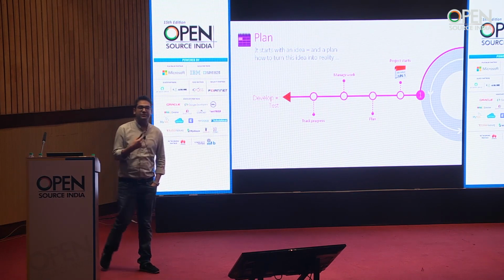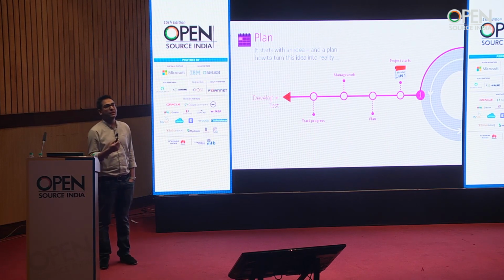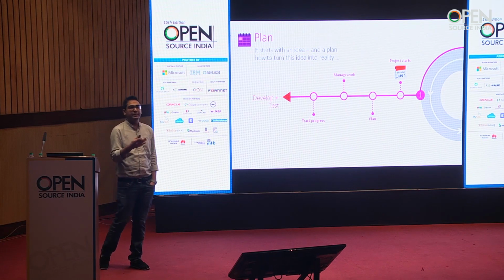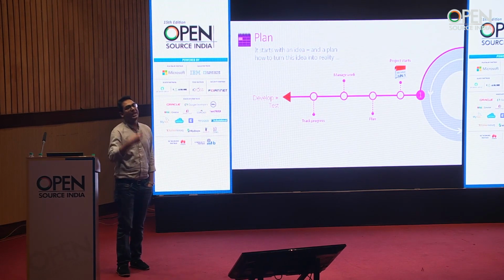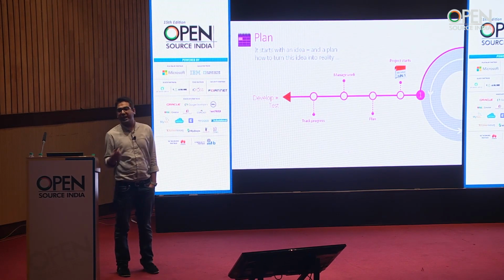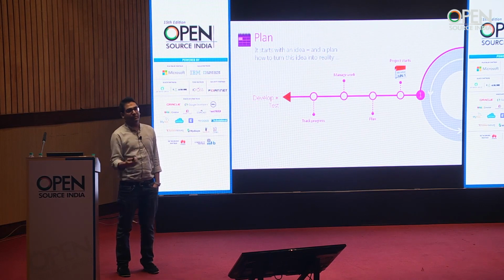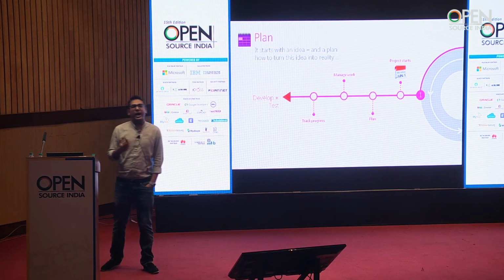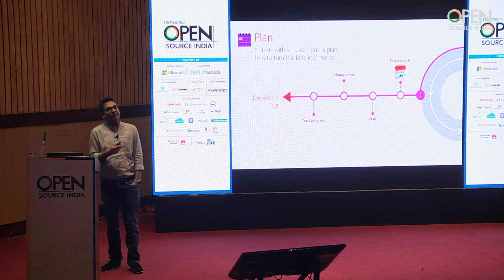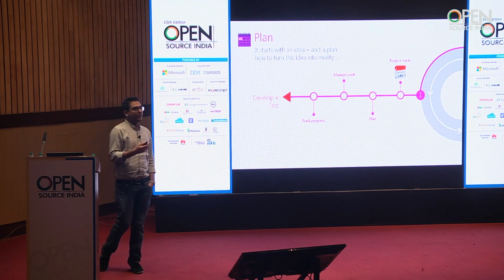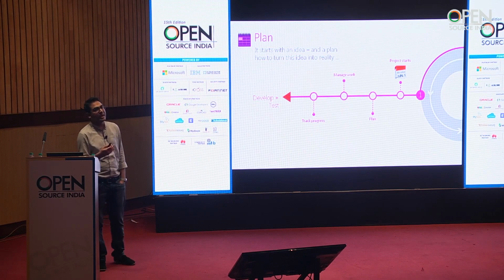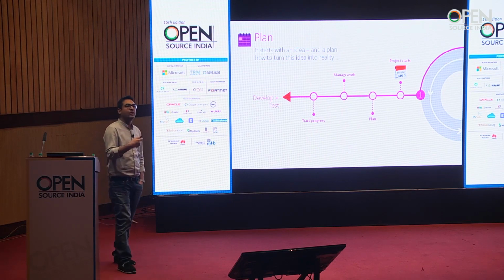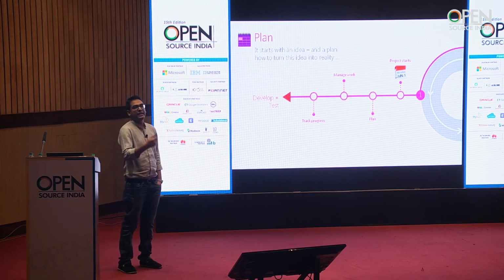Each sprint in our case is of 3 weeks. So we iron out exactly what you would be doing as a development team for the next 3 weeks, and we have a vision as to where we would like to be 3 sprints from now. I, as a product manager, have to always be a couple of sprints ahead of my development team to make sure that we have ironed out exactly what we would like to deliver at the end of the sprint.